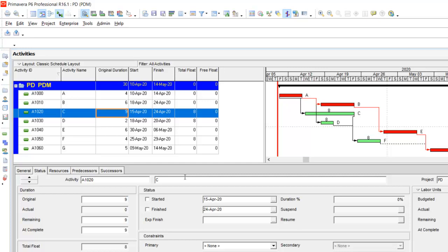So this is the plus point of a free float. Free float in an activity is a bonus. You can blindly use that float without bothering the floats of the succeeding activity. But if you go beyond that, then you have to pay the price in the float of the succeeding activity. So now once again we will go to the original duration and see the total float as 13 and free float as 5 for the activity C.